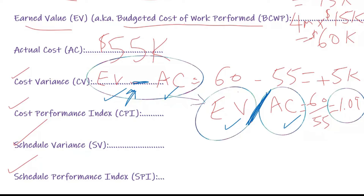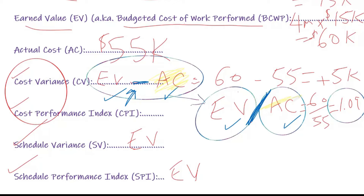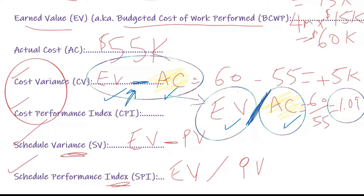All four formulas — cost variance, cost performance index, schedule variance, and schedule performance index — start with earned value. The ones related to cost (CV and CPI) finish with actual cost. The ones related to schedule planning (SV and SPI) finish with planned value. Variance means subtract; index means divide.